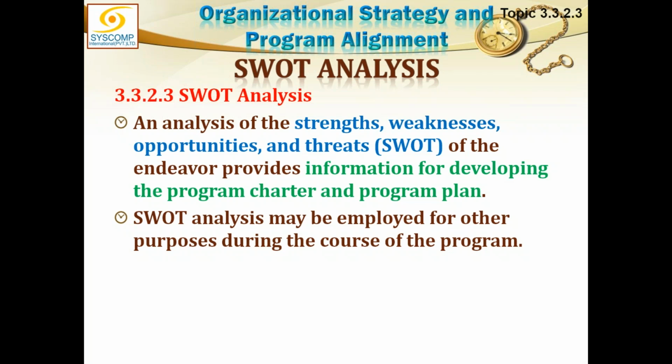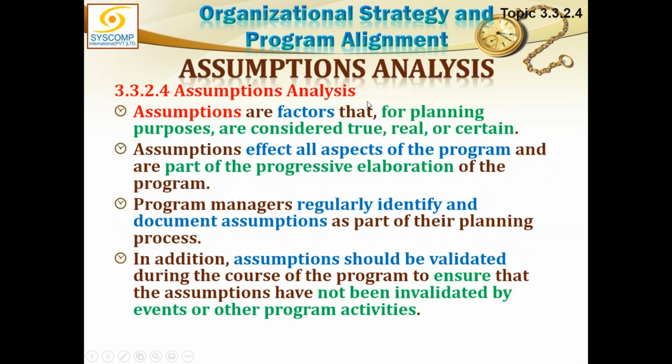It provides information for developing the program charter and program plan. SWOT analysis may be employed for other purposes during the course of the program. Assumption analysis. Assumptions are factors that, for planning purposes, are considered true, real, and certain. We keep making assumptions throughout the life of the program, and these assumptions usually fill in the blanks, and they may be wrong. I did not know how much quantity of something is to be put into a system, and I put in an approximate quantity, assuming it to be correct.